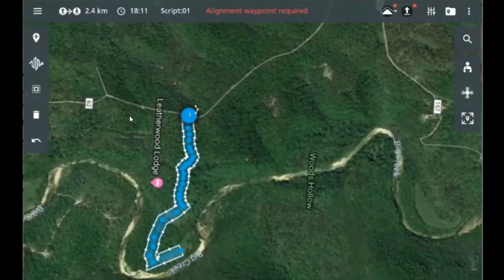Yeah, so Greg, our engineer, arrived on site, and then he and Randy walked the route that Randy thought was the best case for the road, and Greg created some waypoints for us while he was walking the route, and from there that's how we built our flight blocks. It was off what they captured on their reconnaissance, if you will. After Greg and Randy walked that route, they exported a KML out for us, and we used that KML to actually build a corridor mission of the proposed road.